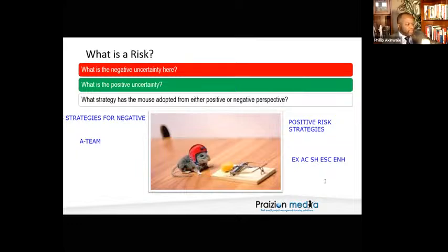Okay. Phil encounters a risk as he's going through his risk register, and the risk is becoming a bigger threat. He decides to purchase performance bonds from an external source. Of course, external. What strategy has Phil adopted if he purchases performance bonds? Or think of it as insurance. What strategy is that? Thank you. Oh, that was quick. Transfer, says everyone. Thank you very much, folks. Awesome. Transfer. All right. So we've talked about avoid, transfer, escalate.